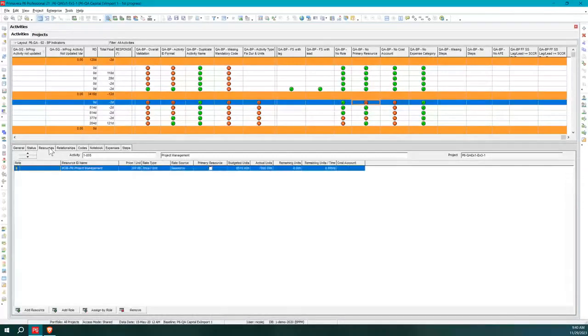Let me just try and explain what the updating one will look at. So the updating one is going to look at things like this. So did I start the activity? If the answer is yes, it's expecting that, hey, I've got a resource and my actuals have something filled in. That's an important piece, because if it doesn't, then more than likely, this means that I missed some information on my update. And things like my earned value may be incorrect. Okay. So that's an important monitoring metric to see whether the actuals have been filled on an activity that is started. That's a big one.